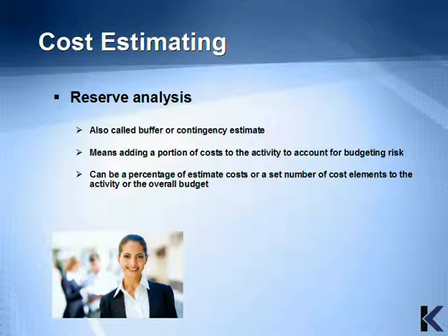The reserve analysis is also called a buffer or contingency estimate. It means adding a portion of costs to the activity to account for budgeting risk. It can be a percentage of estimated costs or a set number of cost elements to the activity or the overall budget.